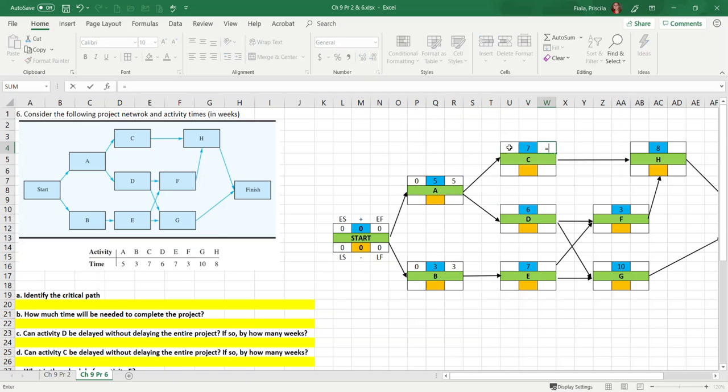So it's going to be the earliest start plus, let me do numbers so you can see it better. Earliest start plus the activity time. That's my earliest finish. Okay, for D, there is only one arrow going in, so it's going to be equal to 5, correct? From your IP, you have 5, is only one, so 5.